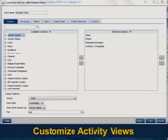So one thing I want to add about activity views is that activity views are enterprise specific. They're global, they're user specific, or they're multi-user, but they cut across whatever projects you have open. So they're not tied to any one project. You can reuse them across multiple projects. That's another added feature of creating the activity views one time and reusing them.